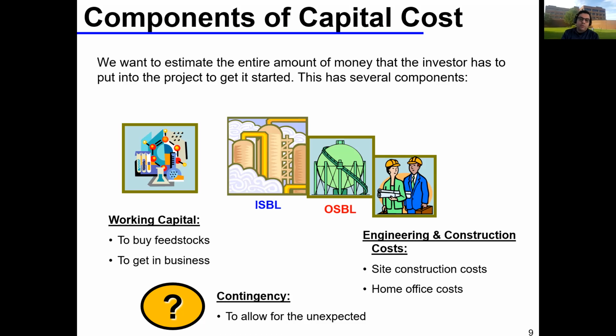You can't get equipment from other countries, and your costs are increasing, and you have a lot of cost overruns. So yeah, include contingencies to account for these unexpected circumstances, right? Or you're designing your plant, suddenly have a safety issue, something pops, and you have to stop. Government, OSHA comes to investigate. You have some cost overruns, you have delays, you have all this stuff. You account for this using your contingency funds.